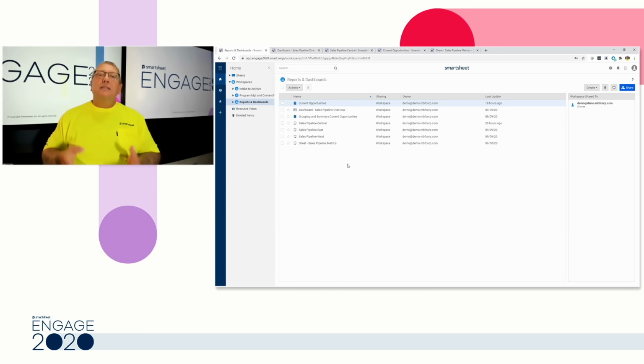They are like a high-level filter that are updated in real time, and they're bi-directional. So updates on the sheet are reflected on the report, and changes on the report can be reflected onto the sheet, all back and forth, all real time. And so that's what we're going to be building first. And remember, that was part of what was on the dashboard. I right-click and I select report.